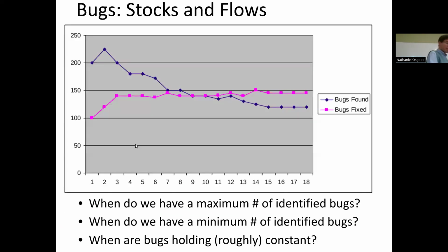Now here we have, over time, days in a slow-moving project. It could be, well, maybe it's weeks, given the scale here. This is the number of defects found per, say, week. Week 3, we have 200 defects, right up there. These are the number of defects fixed per week in the magenta. So on week 3, we had about 140 defects fixed. You get that sort of situation.